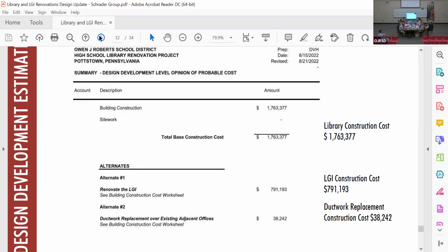So we're addressing that in our cost estimate by maintaining that escalation factor and continuing to monitor where bids are coming in. We have another bid coming in next month that will again review all of our cost estimates to determine if we're on target.